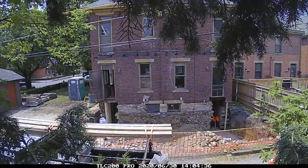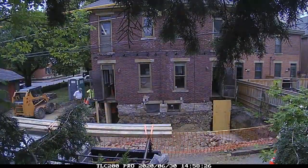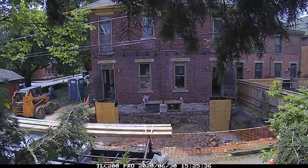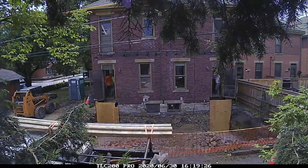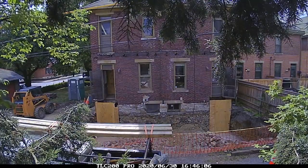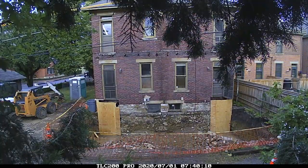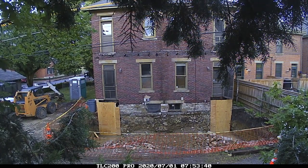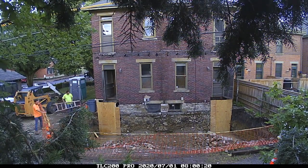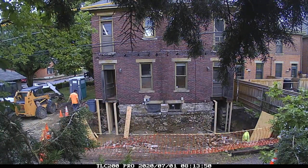We have had Dave Holtzapple, along with Greg Fraker, two structural engineers, assist us with this project. And in fact, we have demolition sequence stamped plans orchestrating the process of removing which load-bearing components of the structure, while then adding in temporary support walls and structure.